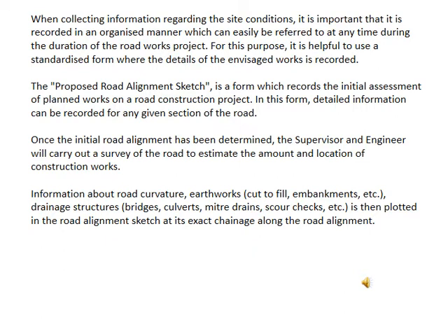When collecting the information regarding the site conditions, it is important that it is recorded in an organized manner, which can easily be referred to any time during the duration of the roadworks project. For this purpose, it is helpful to use a standardized form where the details of the investigated work are recorded. The proposed road alignment sketch is a form which records the initial assessment of the plan and work on the road construction project.